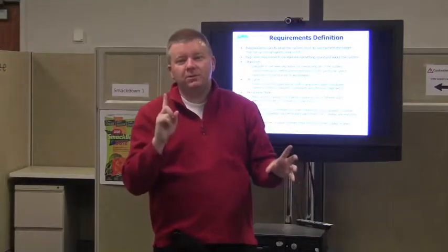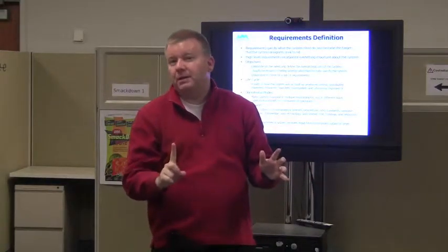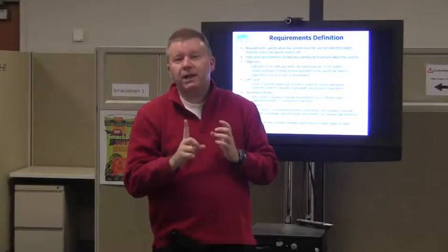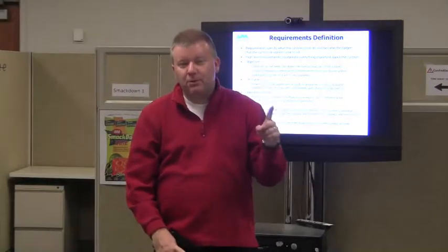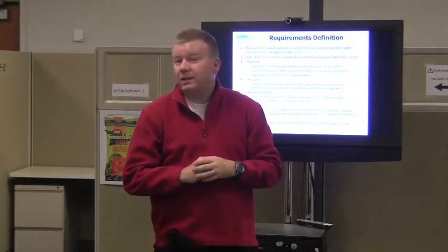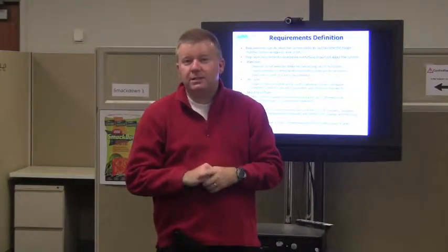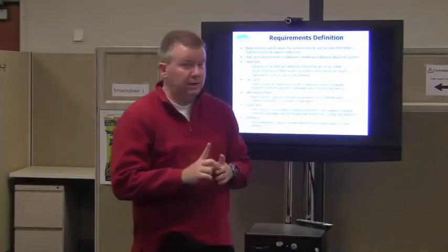Everything does. If you have a requirement that is not linked to an objective or a need, it should not be there, okay? Everything should support what the system is supposed to do. If you have a requirement that doesn't support the overall objective and the overall need, then it's not necessary. You've added something too much, and you'll eliminate it.